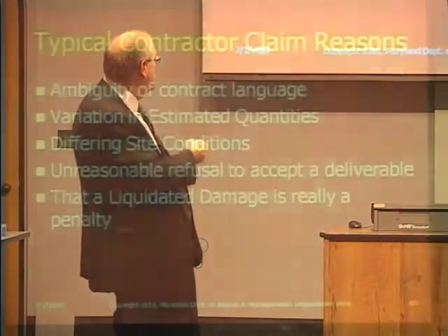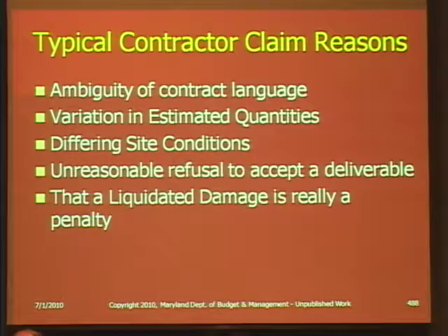That is a differing site condition. If they were led to believe that they would encounter normal soil and there was no indication they would have to be digging in granite, then they are entitled to money under a differing site condition. So they're entitled to the value of those 10 or so extra days of effort. Or the other thing that could have happened is that once they encountered that situation, perhaps you'd have said, all right, move the fence. But then it depends on how extensive the granite was. Right. And did you need it right there, or even if you could move it 5 or 10 feet, maybe 5 or 10 feet still is in a point where there's granite.